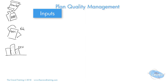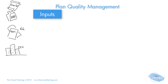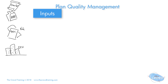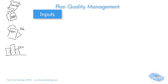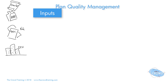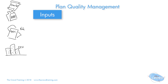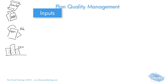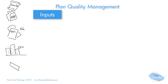The other two inputs we commonly see in almost every process are the enterprise environmental factors, or EEF. Those have to do with the industry you work in, the business, the culture, the project organization, and the environment. For example, if we work in a strict policy-procedure environment like making medical equipment, the quality expectations are very rigorous — very different from a startup where you just keep breaking things until it works.